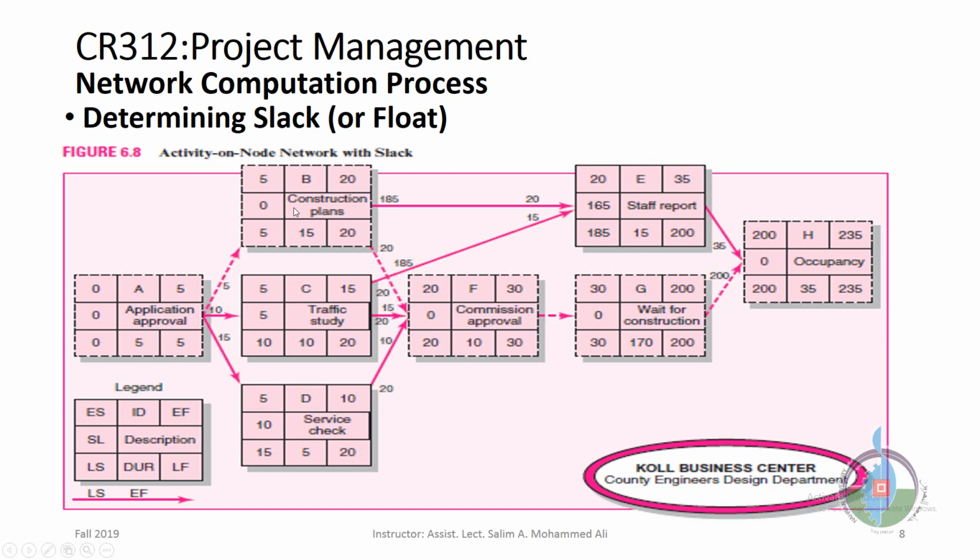We don't want to mess with these activities. We don't want to delay these activities, because if we delay any one of them, even by 1 day, it will delay the whole project by 1 day. Okay?